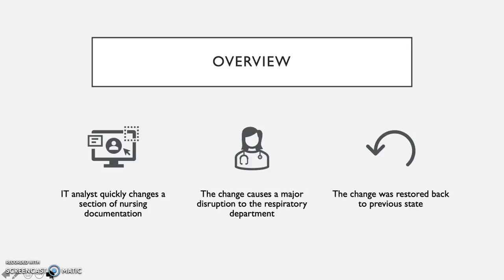My assessment is there needs to be changes in policies and procedural protocol regarding change control. My recommendation is to establish proper procedures, implement a board, implement request forms, and hold regular meetings regarding change control.